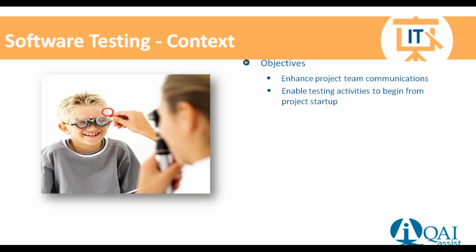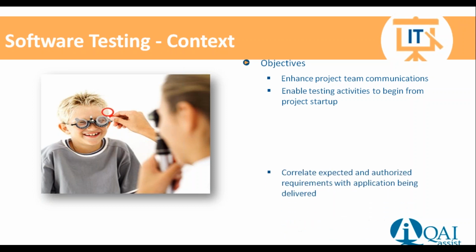There's going to be an emphasis on testing activities and deliverables from the outset of the project. Instead of, at the 11th hour, the development team throwing all of the code over to the testing team and saying, there you go, test it in 3 days. The idea with the software testing lifecycle, and one of the objectives, is to have testing activities start when the project is starting, to have some forethought there.